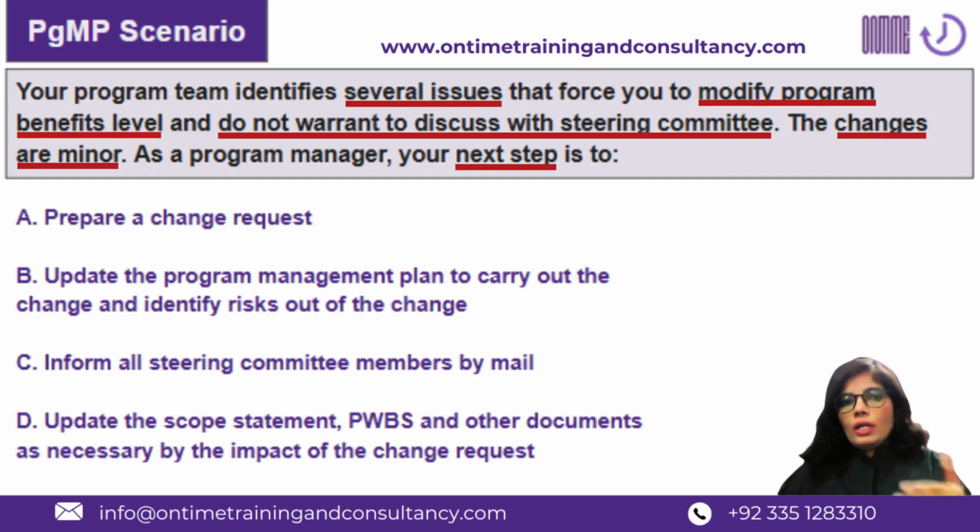So before I talk about the options, you should be knowing how the change management process works. It's important. It's pretty much an exam important topic. The first step of any change in the program is to prepare a change request or issue a CR. Right? The second step is doing the impact analysis.